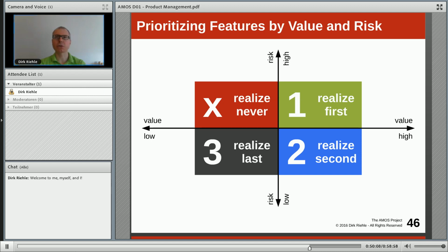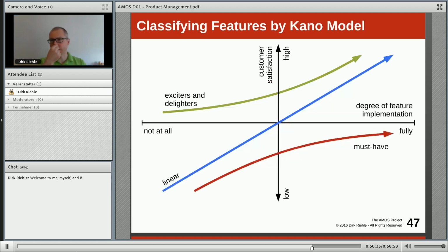High business value first. There are actually other constraints that come into play as you try to prioritize your backlog items. Most obviously, dependencies. Some functionalities simply come before others. So you cannot implement B if you haven't done A yet. That's one thing, and a couple of others. Let's look at those in a few slides.